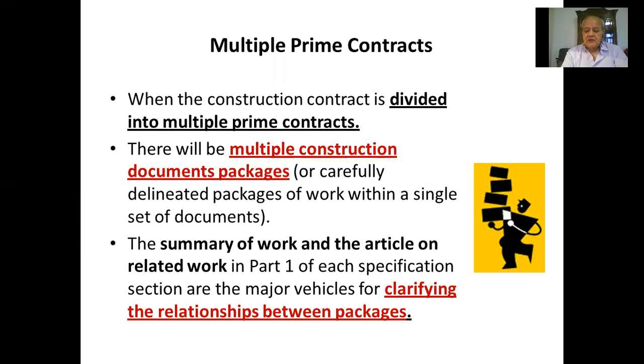As I said, if you have several contractors, then we need to divide the project among them in different packages so that we can have different parts of the site or different buildings or different trades. Maybe you will get one contractor for the concrete work. They only do the foundations and concrete slabs and columns and beams, and they finish. And then you get another one for the brickwork and finishing materials.